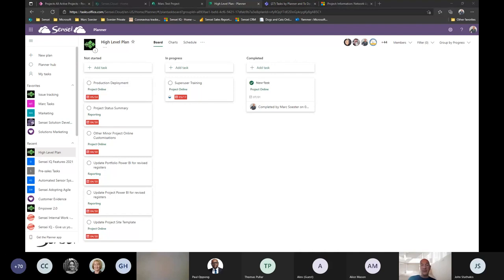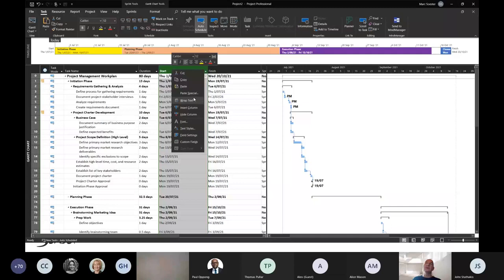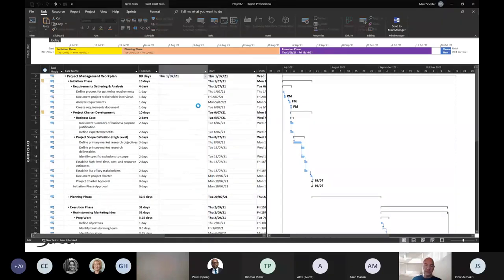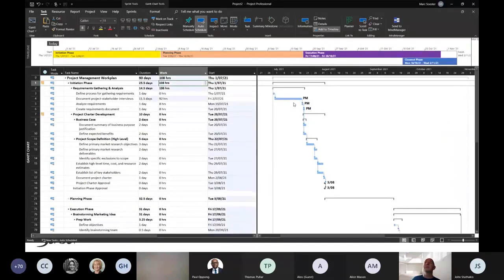Well, when I now compare that to something like MS Project or Primavera, there is a certain amount of knowledge that you need to have. You need to understand the difference between duration and effort, which is called work in projects. What impact it has when you move certain tasks over. If you assign resources, what does that mean? If you actually baseline that, and if you need to determine critical path, these are certainly things that a citizen project manager or an everyday user wouldn't necessarily know. A professional project manager knows that.